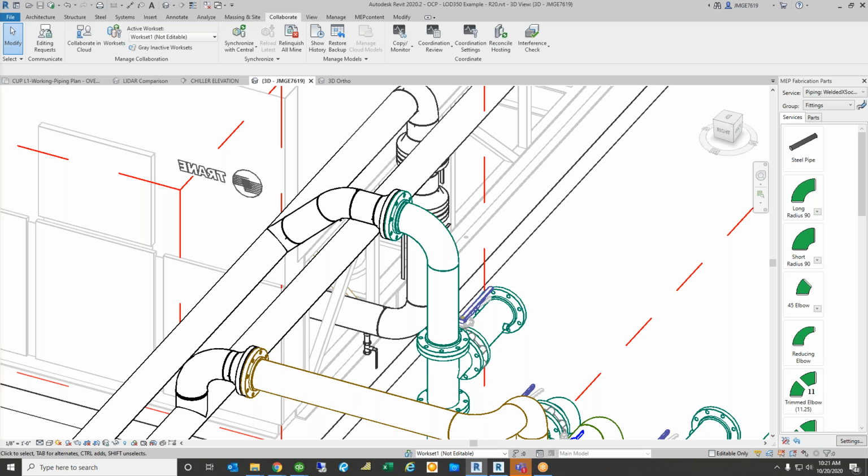So the way I've done it historically, and part of this is a recognition of where our industry is: right now, our industry uses Revit modeling, 3D modeling with some level of information in that, the I part of BIM, right? There's some level of information in there in order to generate construction drawings and get them out in the field. In my experience, it is extraordinarily rare that owners are willing to pay the consultant to as-built that Revit model at the end of the project. It happens, but it's rare.